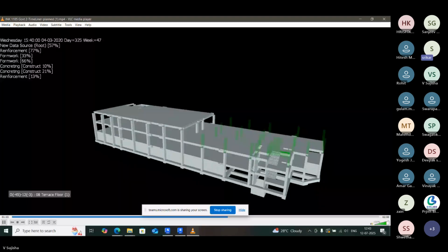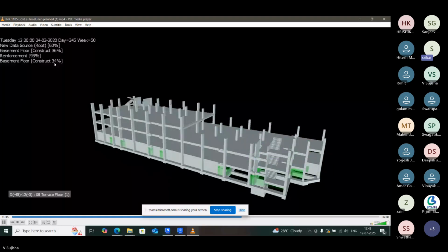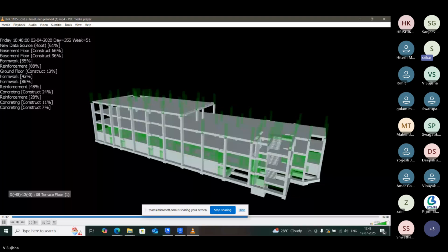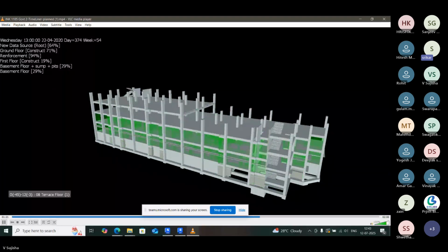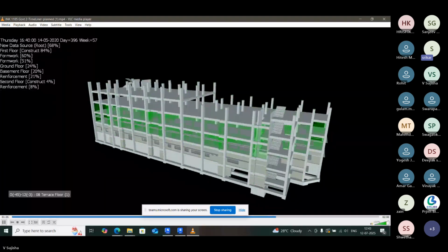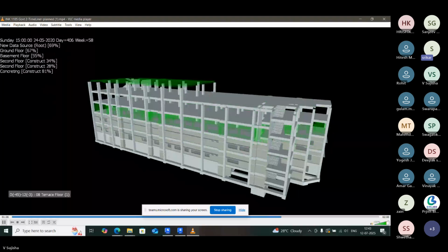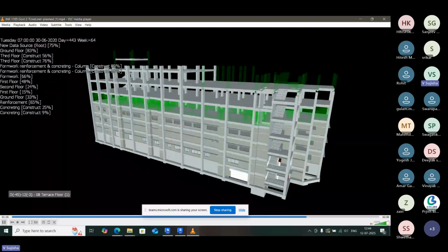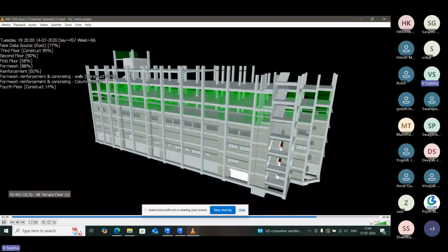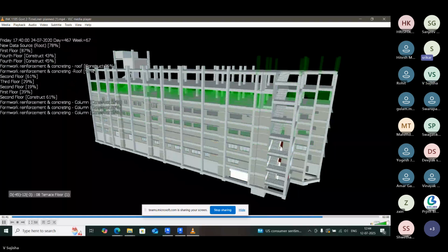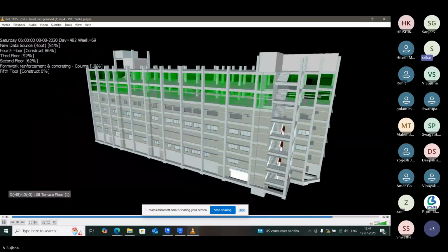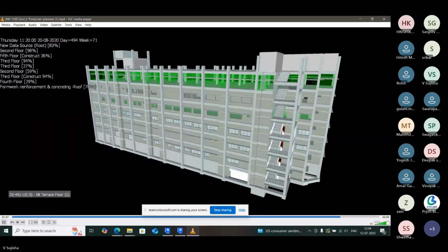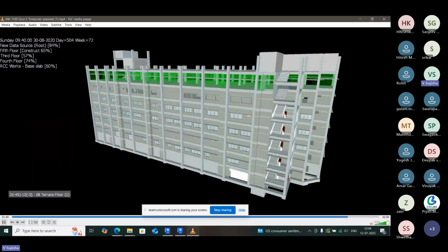I just have a doubt. Till the time the simulation is done, the percentage complete is always a manual entry, right? Is there any way that can be integrated from the site, like automatic updates getting posted? No. You need to enter it here. You need to enter the actual percentage of completion, or otherwise give the date of completion so that it will automatically calculate the percentage of completion. Okay, then there is a possibility of human error always, right? Yes. That cannot be extracted directly.